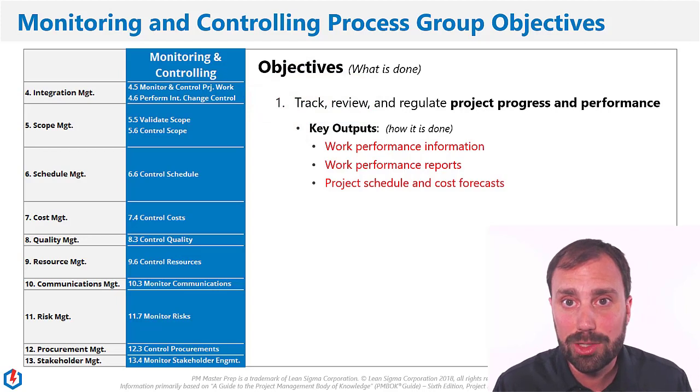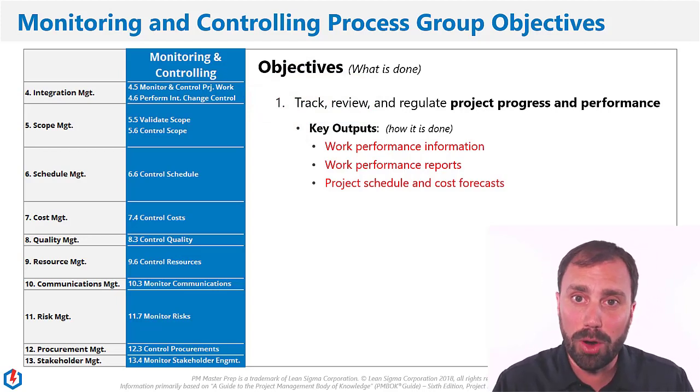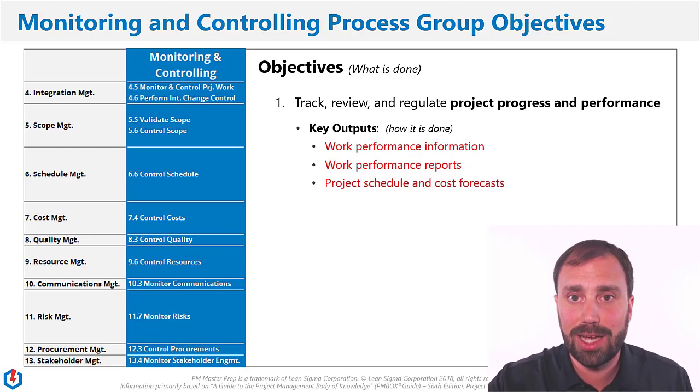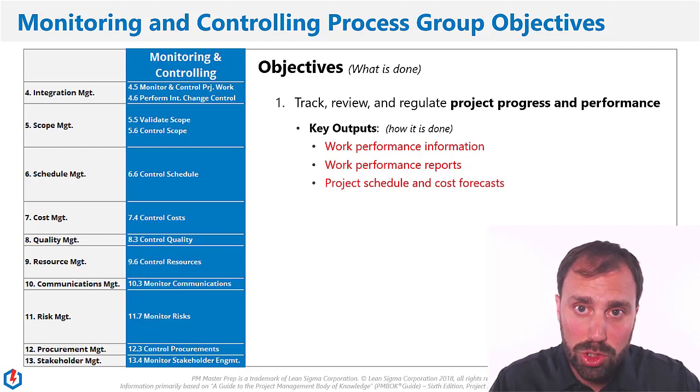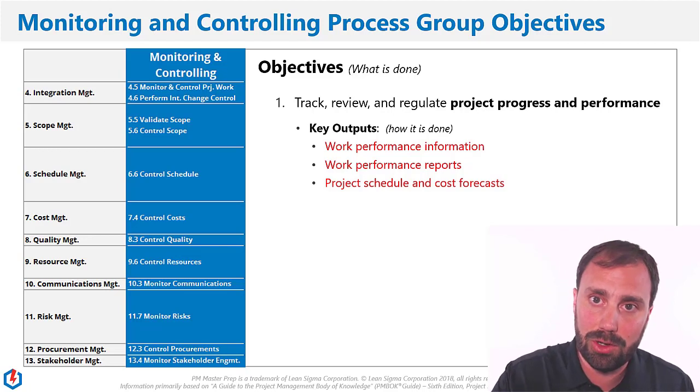And then if those change requests are approved, they go back to executing to inform the actual plan of the work that's going to get done and how the work's done, so we can modify it there. And then it comes back down and we assess, how did we do with the new change requests that were implemented and executing? And then that process continues to roll over.